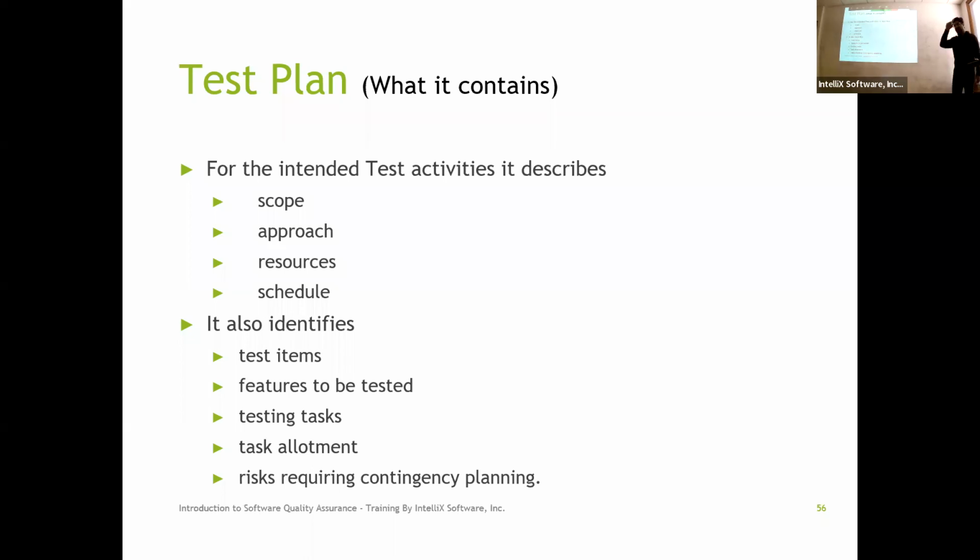So if you think about it in that V, it's great that you can write all the test plans, but can you execute any of them until the software is actually delivered? You can't. That's a big risk. If you talk to the project team and say, hey, I'm going to give you software at this time, and then you have 3 weeks to do the testing.